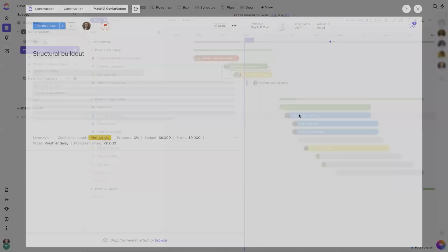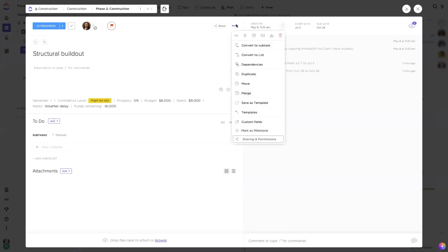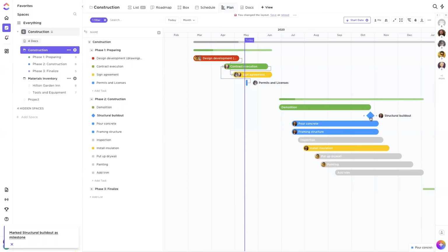We just released a new Milestones feature as well, which is used to signify the end of a big group of tasks, such as, in our case, maybe a new feature being released. So if you have a task in a project that you're working on that you consider a milestone, you'll be able to open up the task and indicate that here. And that will be visualized in your Gantt view as well. So you'll easily be able to pick out those milestones and see them in the Gantt view. And keep in mind that Gantt view can be exported as a PDF to be shared with others.